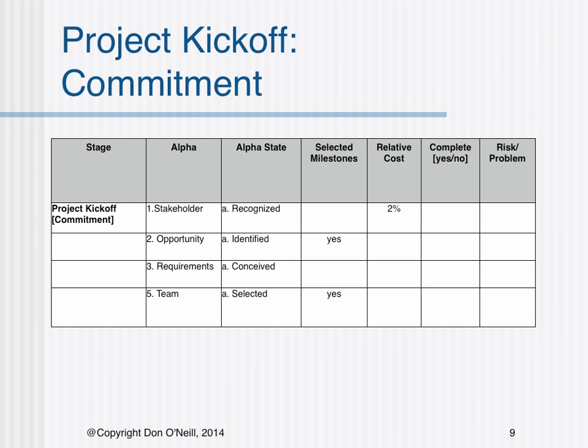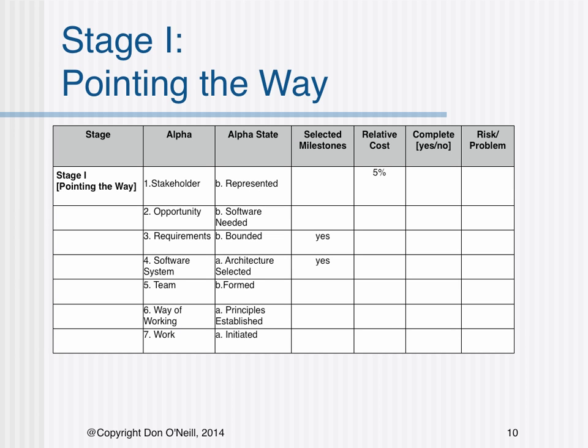The project kickoff is intended to initiate commitment among stakeholders to the opportunity identified and the conception of requirements. In addition, a team is selected. Chief among these is identifying the opportunity and team selection. Stage 1 is intended to point the way forward. Here, individual stakeholder personnel are identified, the opportunity involves software, requirements are somewhat bounded, and the software system architecture concept is selected. The team has been formed and has established a way of working, and work has been initiated. The critical selected milestones revolve around bounded requirements and architecture selection.